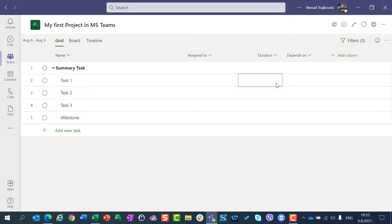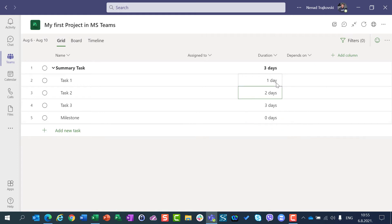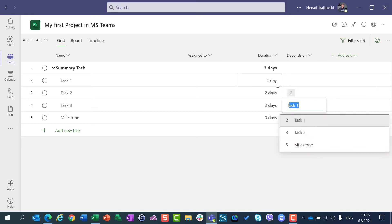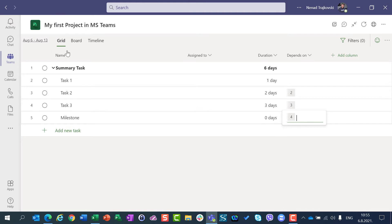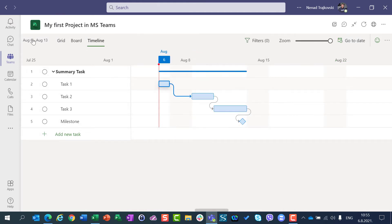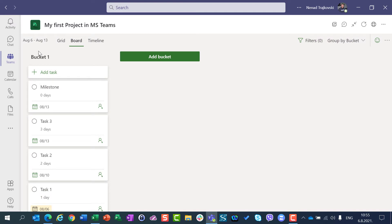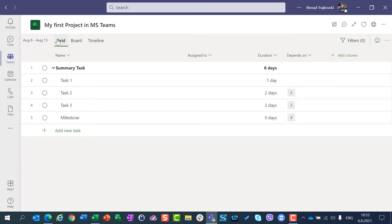I'm going to set Duration: 1, 2, 3, 0. And the 'Depends on' for Task 1, Task 2, and I will say Task 3. I can see everything in Timeline. I can go to Board. I can add buckets. I can arrange those tasks. I can do whatever I want.